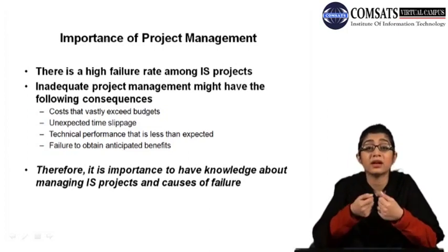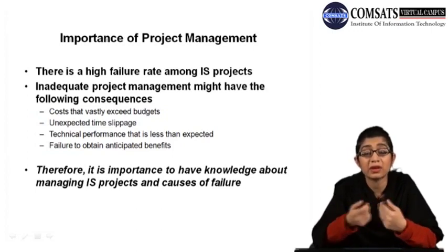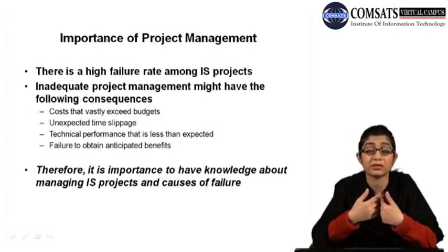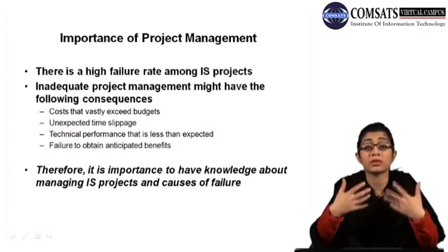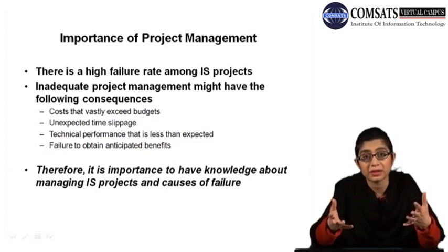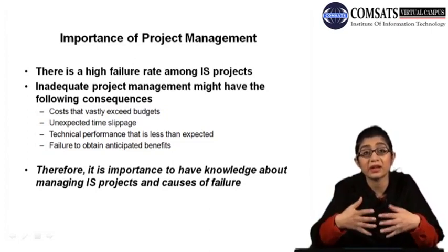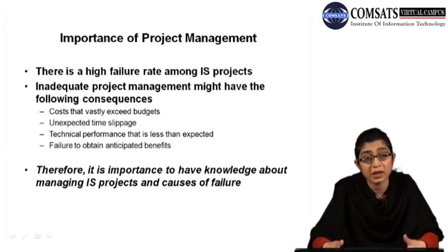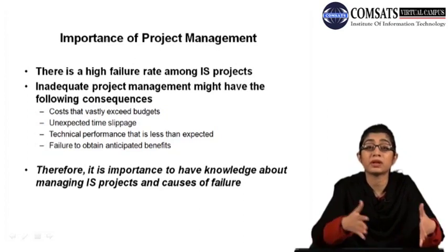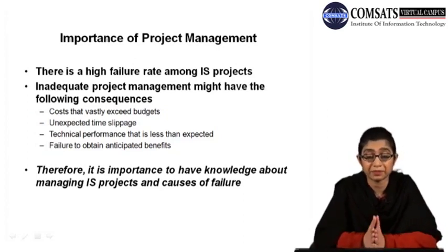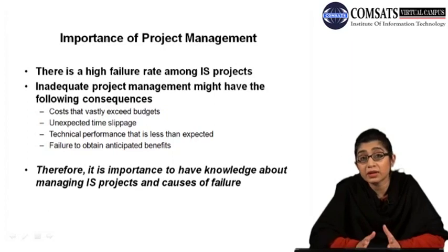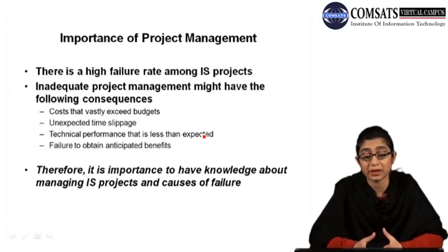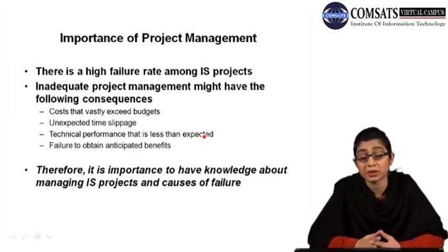Why? Because either they underestimate their business value, either they underestimate the costs, or they underestimate the time that is going to be required. For example, if they want to implement again an enterprise system or an ERP system, then again they have to be very careful about the planning. They have to be also very careful about how much time is going to be required for implementation of the whole project. Right, as you can see on the screen here, we have a list of consequences that can happen because of inadequate project management.